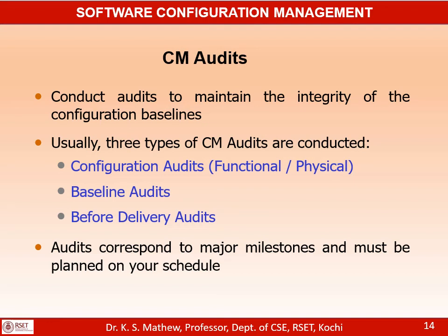Baseline audit. This is normally done at the end of every phase. Once a phase is over, normally the work products will be reviewed and baselined at the end of every phase, and after that the baseline audit will be carried out before the project team moves to the next phase.